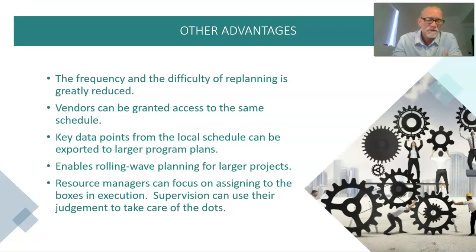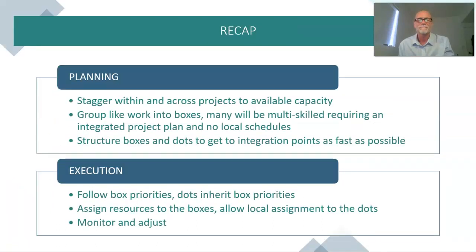I think this is also a big point for resource managers. When we talk about resource deployment, I really want to make sure that I'm deploying resources at the box level and releasing that work when I have capacity to do it. So I release it at the box level, then allow local supervision to execute the dots. That really keeps everything in sync.